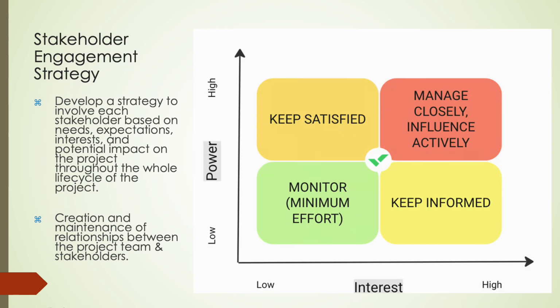Managing stakeholders effectively follows a structured four-step process. It begins with stakeholder exploration, where all potential stakeholders are identified and understood in terms of their interests, influence, and expectations. Following this, the process moves into stakeholder analysis and mapping, which involves categorizing stakeholders based on their power, influence, and interest levels. This step ensures that engagement strategies are appropriately prioritized and targeted.